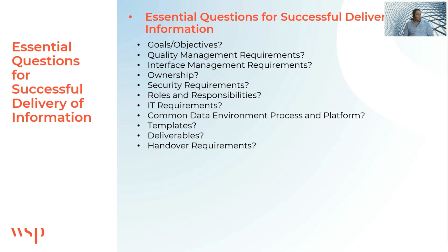In addition to this, what are the IT requirements? This covers both software and hardware and any other IT requirements. The common data environment, process, and platform. What will be used in this project? Are there templates for the project? Will we develop templates from start, or will we appoint a specific party, for example, to develop these templates?